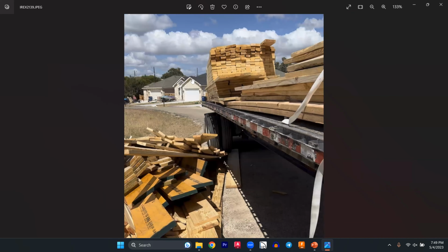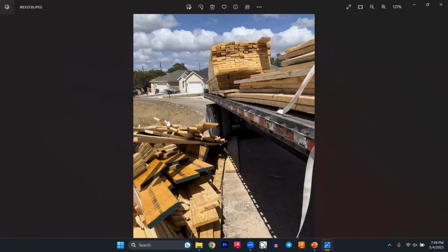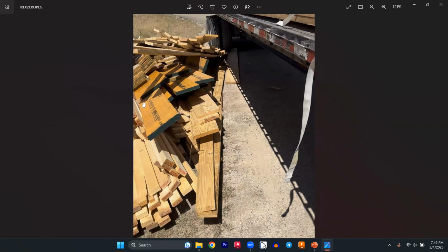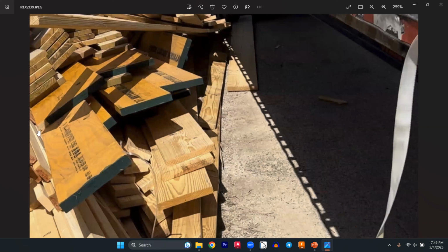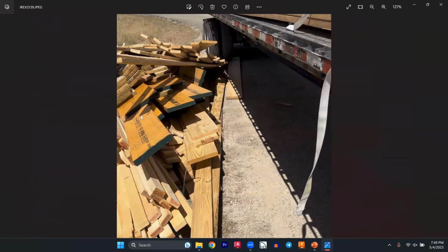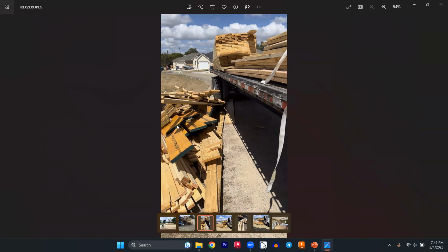What you're looking at is a truck with lumber on the side, and there's a kind of a ditch on the left with some steeper grade. Now, these shiny wooden ones, like the big huge boards, these are LVLs, and they have naturally more of a slippery coating on them. So whoever stacked the lumber stacked it too high, and these were on the bottom or something. So this truck driver drove on a slanted grade, and they literally slid off the truck. This happened about 100 or 200 feet from the property line of the property that this was supposed to be delivered at. The stuff was supposed to be delivered back behind the slab. So this basically just complicated everything because this stuff literally fell out on the ground.